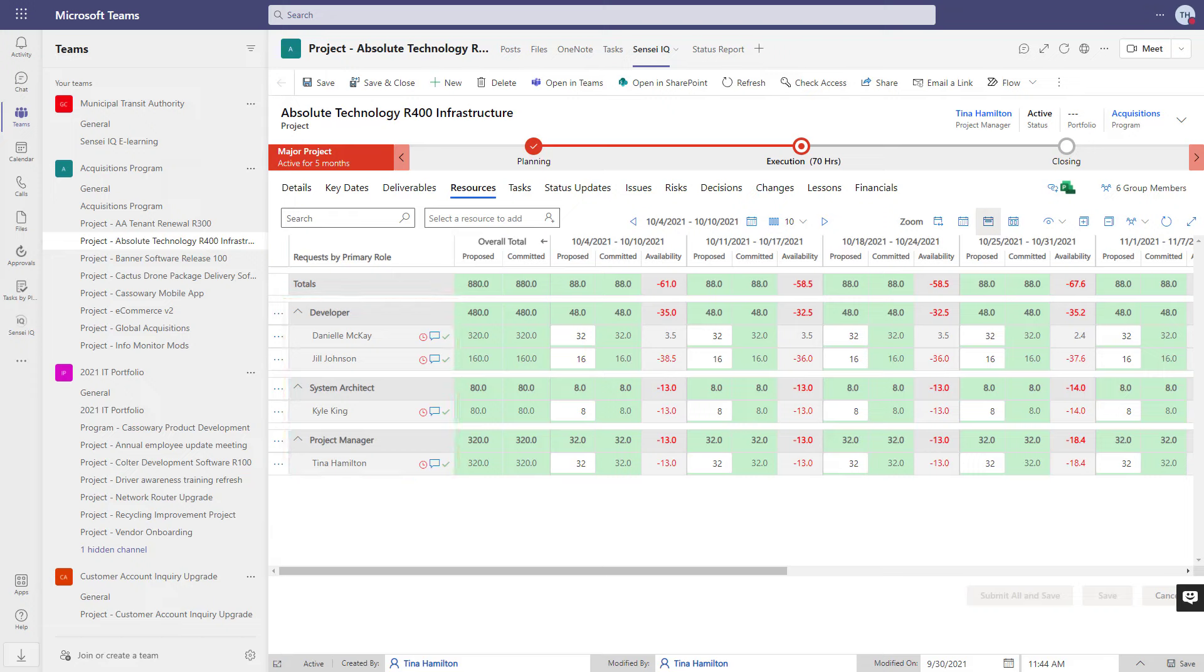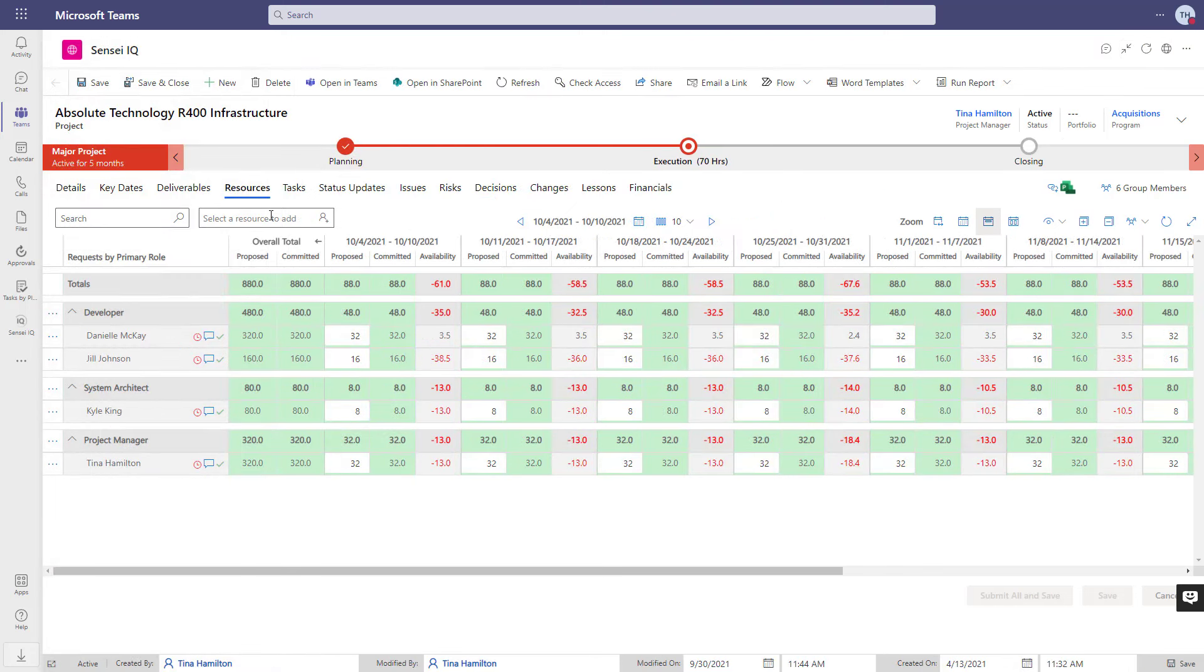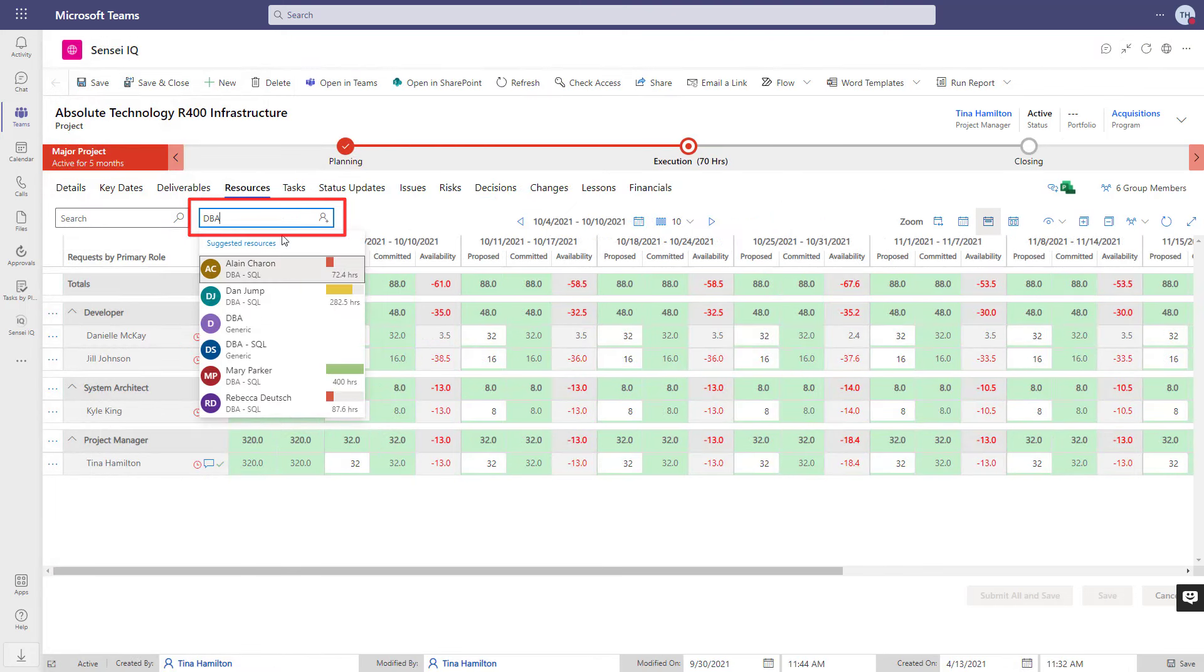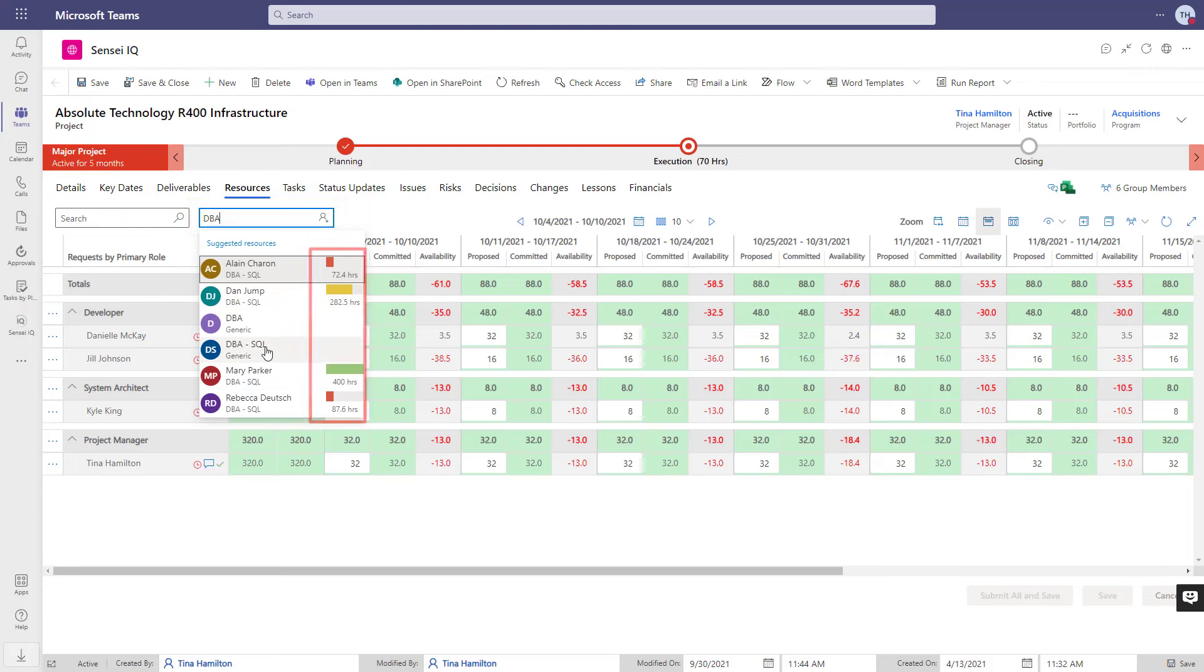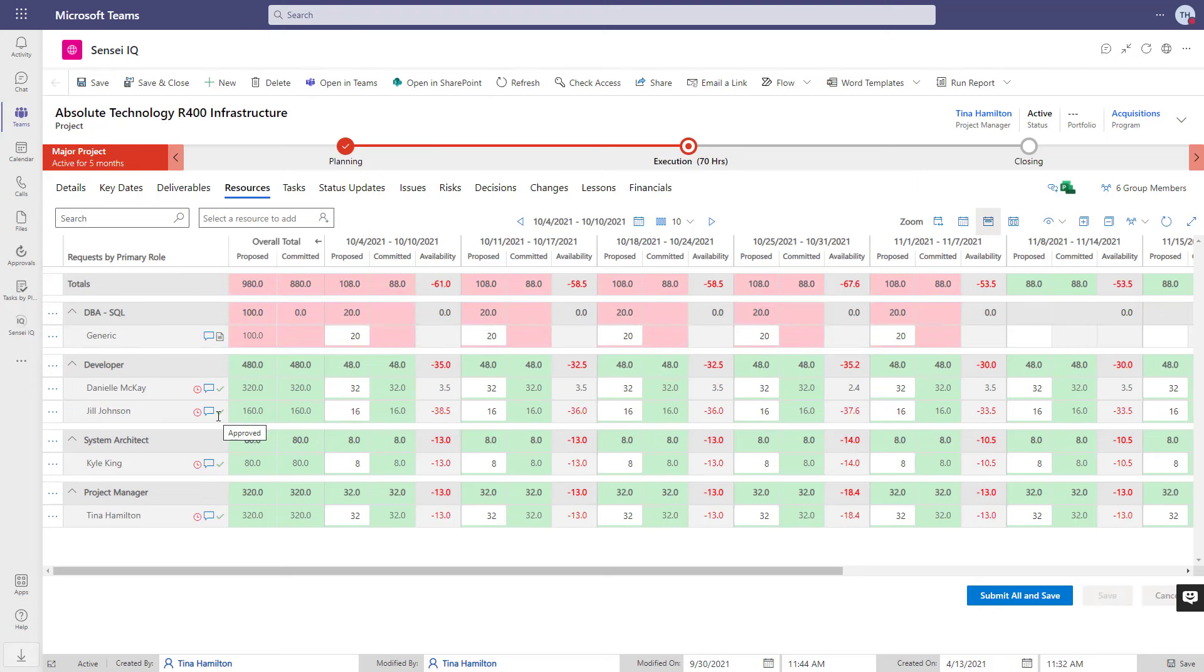Now, we've just identified that we need a SQL DBA to support us part-time for the next five weeks. I'm not sure who's available, and I'm not the resource manager, so I'll search for the generic role of DBA SQL. I get a little preview of the folks who are in that role and what their availability is over the time period I'm looking at.